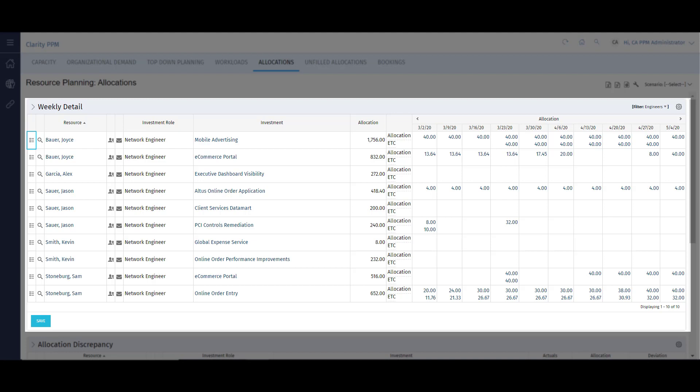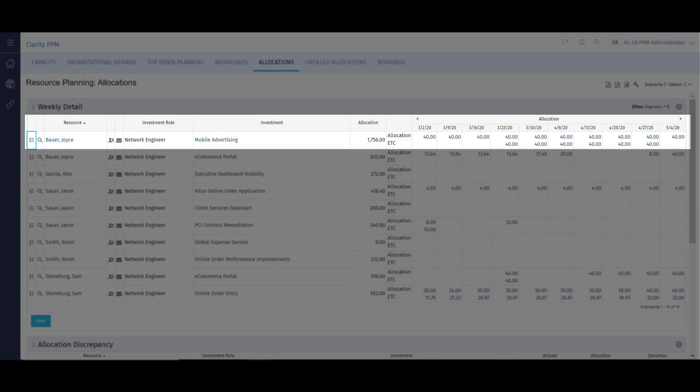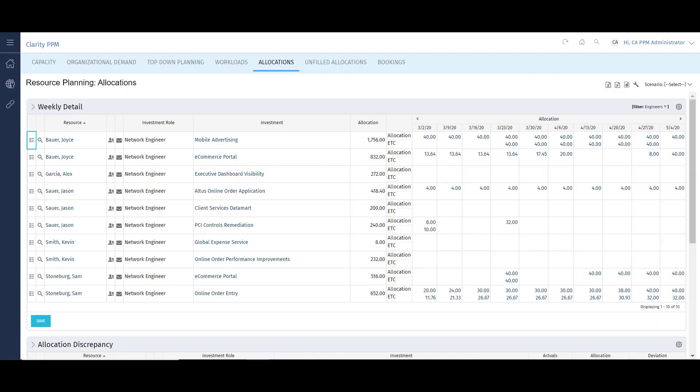The ETC represents the hours by resources being assigned on tasks by the project manager. So where I see I've allocated 40 hours of Joyce's time starting now, the project manager isn't assigning her any work until late March. As a resource manager and as an organization, I want to make sure my resources are being fully utilized. This view gives me visibility into the gap between resources being on a project and actually working on assignments.